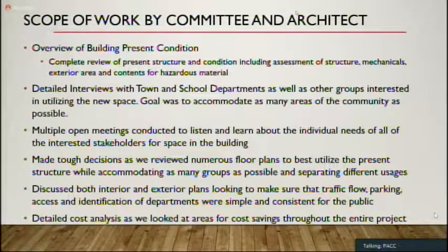We spent quite a bit of time this past late winter, spring, trying to sharpen the pencil on the cost. The construction cost estimate initially came in a few $1 million higher than what we landed on. And there'll be more discussion on costs a little bit later in the presentation as well. But at the time, back in the spring, the construction cost estimate was estimated to be $18.5 million, and I'm rounding the numbers.